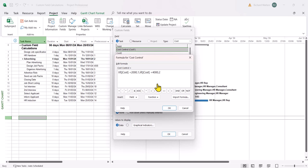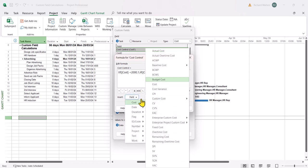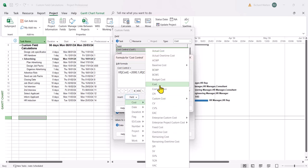My final test. So another comma goes in now to do another IF. So and this is how you can write it in Excel as well, pretty similar. So open bracket and do another cost. And this I'm going to say is greater than or equal to 4,000. We're then going to put a comma. It means then we want to show what number. We'll tag it with a number 3.